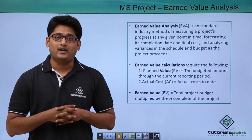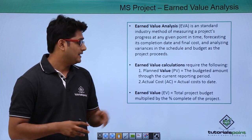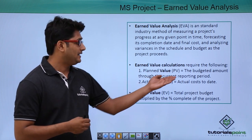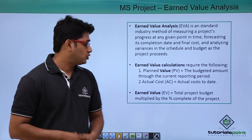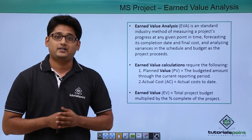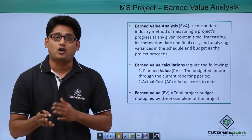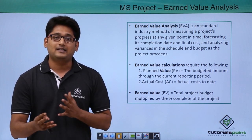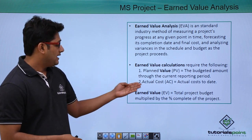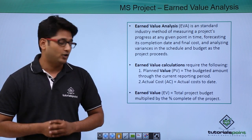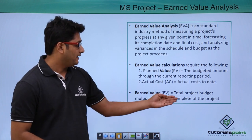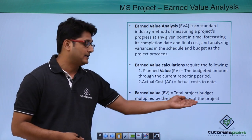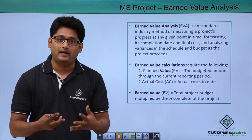For Earned Value Analysis we will be needing two things: first is the planned value, which is basically the budgeted amount, and also we need the actual cost, which is the actual cost of the project till date. Earned Value is also calculated by multiplying the total project budget by the percentage completed by the project.